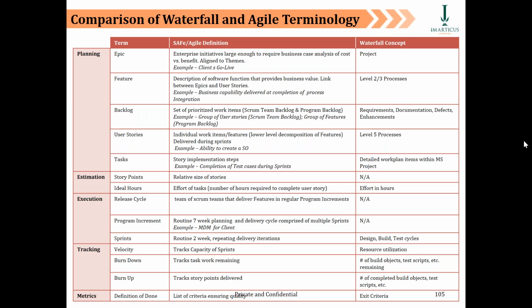Okay. All right. Next query, Rishabh says, we write the user stories on a high level in the product backlog with the product owner. So first of all, no, you don't write user stories, but yes, you help the user to shape up the user stories, and in that way, yes, you do that in the product backlog cycle with the product owner. So users give user stories, but you and the product owner jointly shape it up into a requirement.